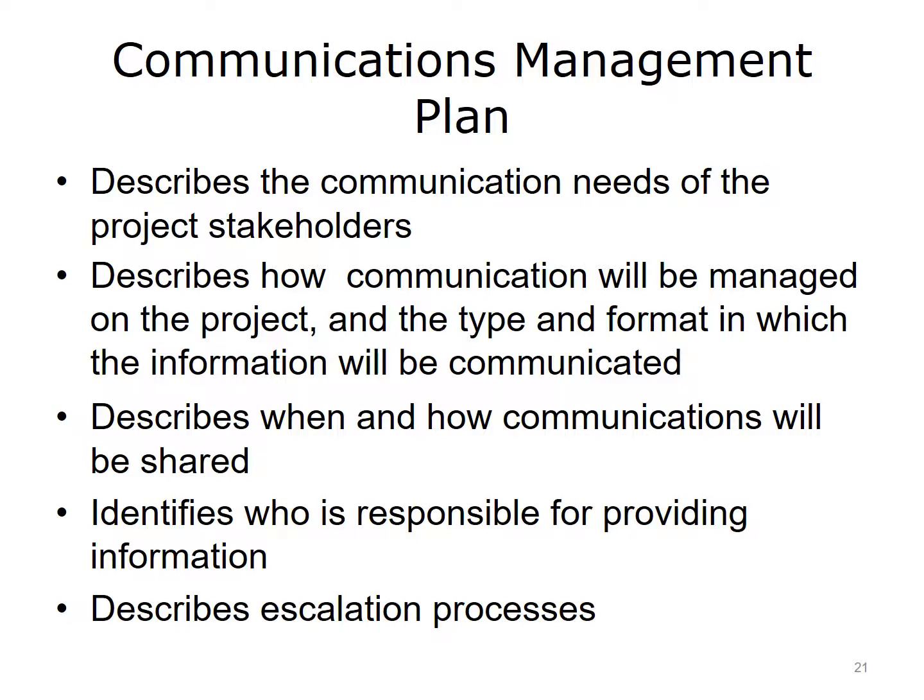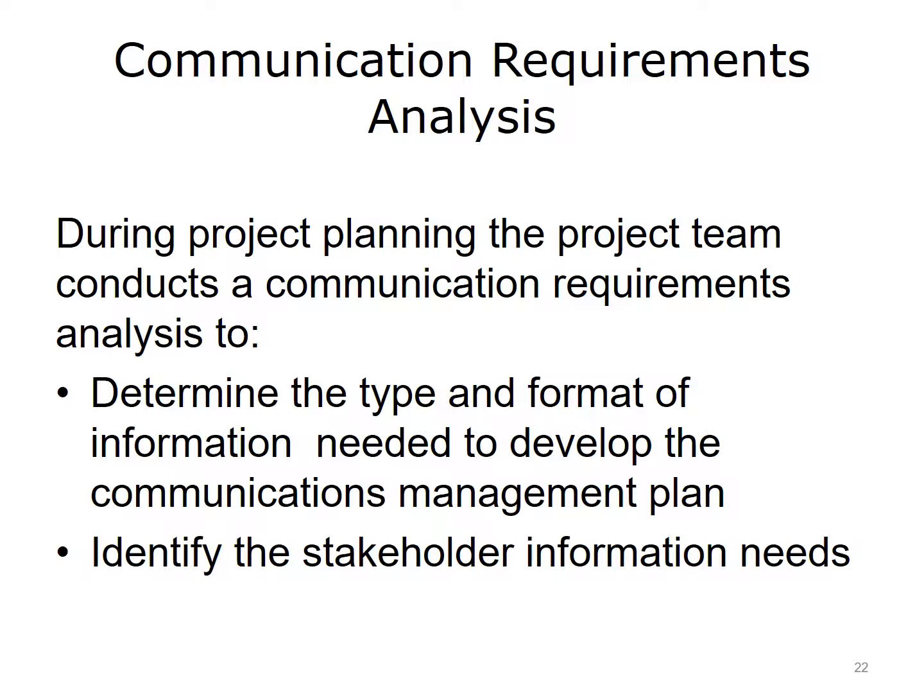The Communications Management Plan describes the communication needs of the project stakeholders, describes how communication will be managed on the project, and the type and format in which the information will be communicated. It describes when and how communications will be shared, identifies who is responsible for providing information, and describes required escalation processes for communications. The project team conducts a communication requirements analysis to determine the type and format of information needed to develop the communications management plan and identify the stakeholder information needs.